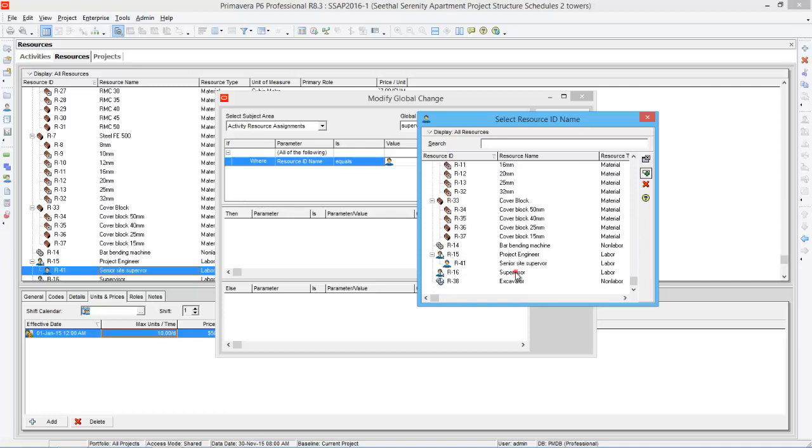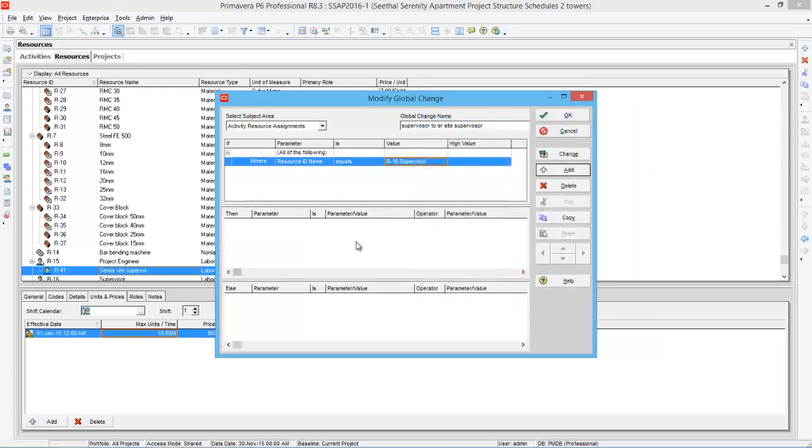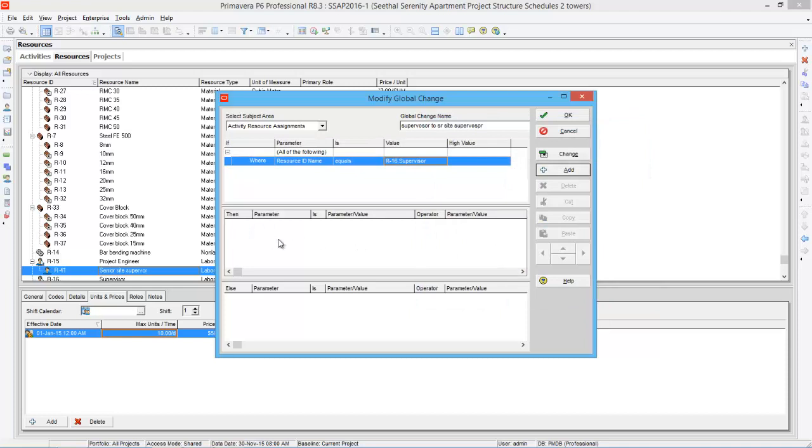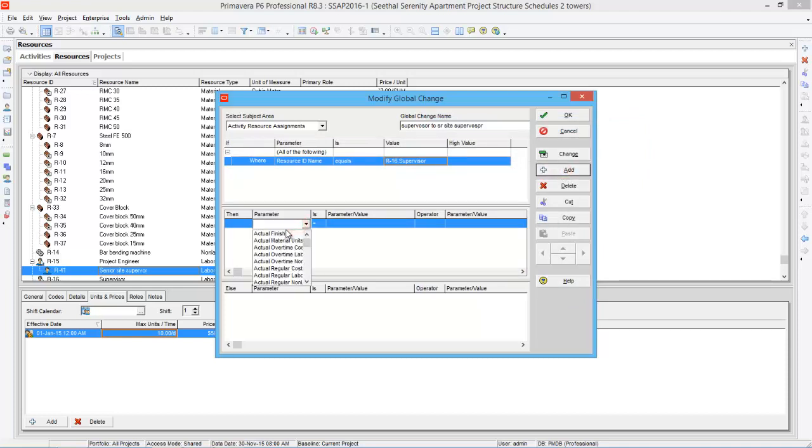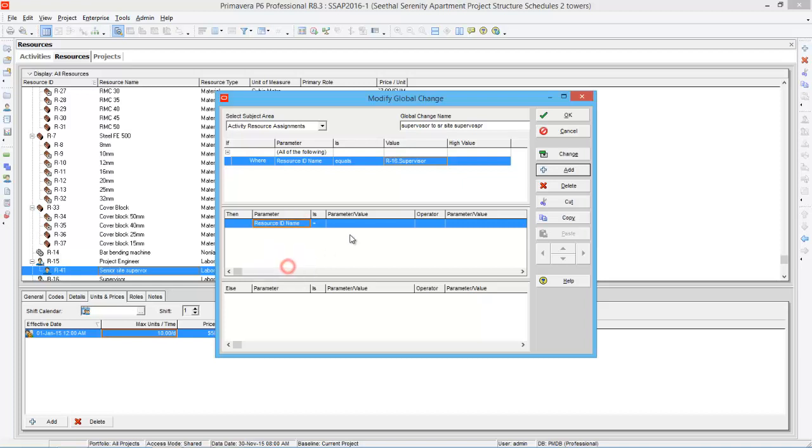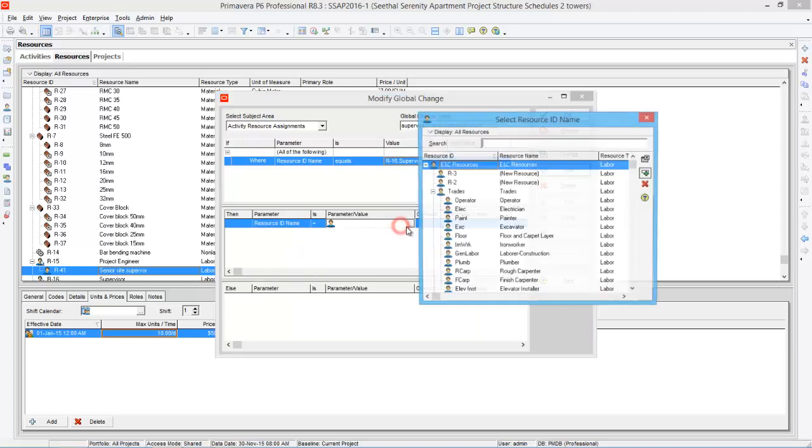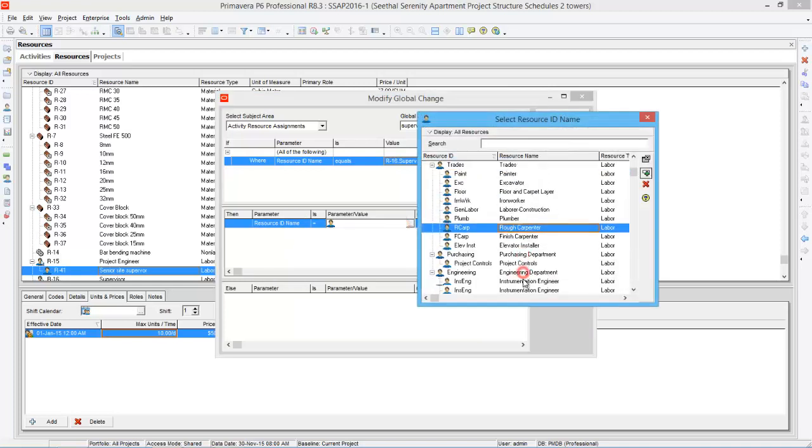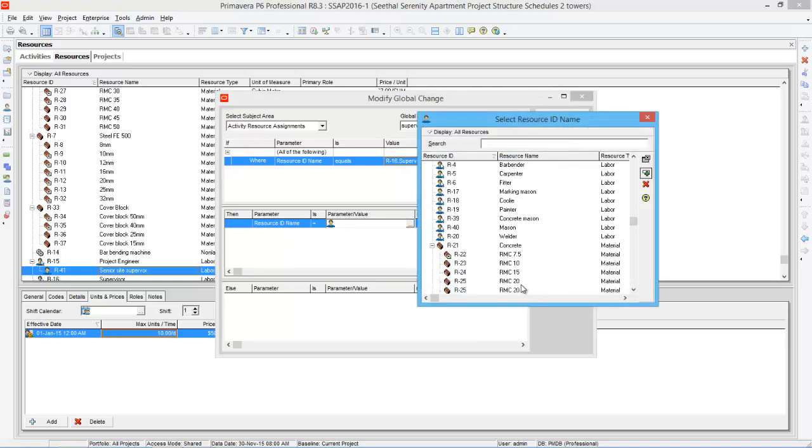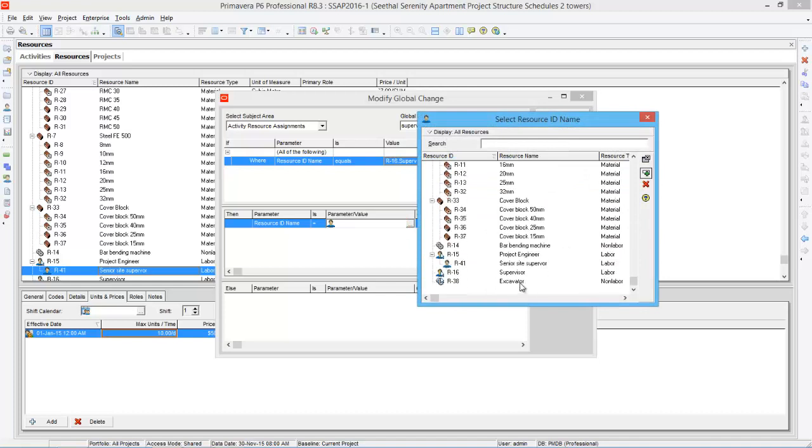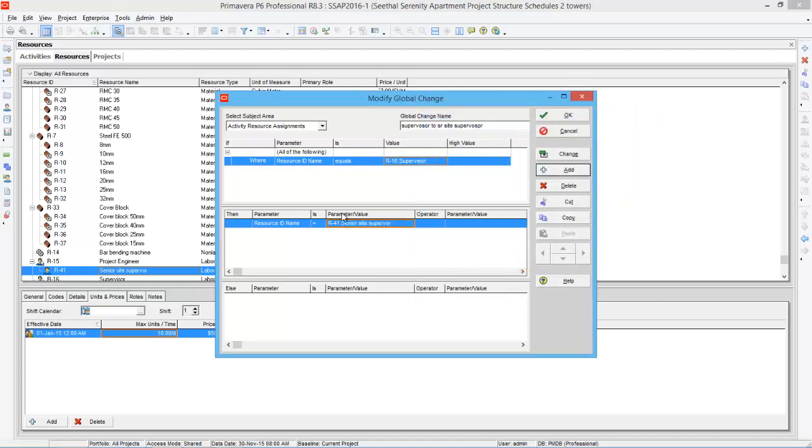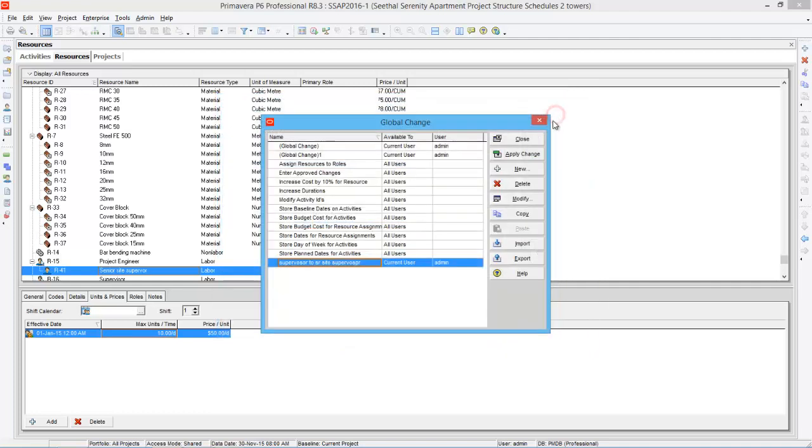Then you can give the condition, if where resource ID name equals supervisor, then click here, press add again, then say the parameter resource name equals senior site supervisor, then resource ID name equals senior site supervisor. After that press OK.